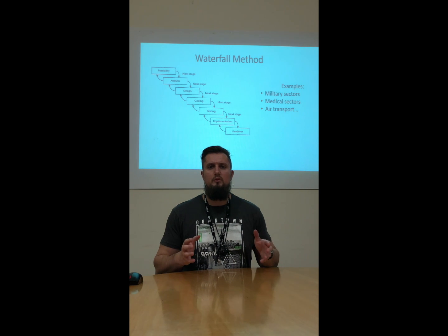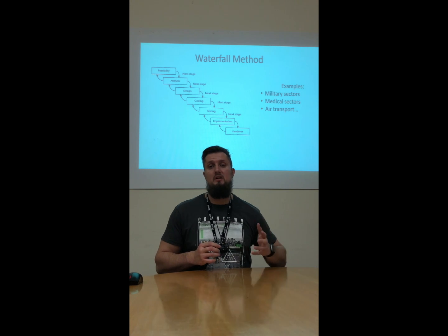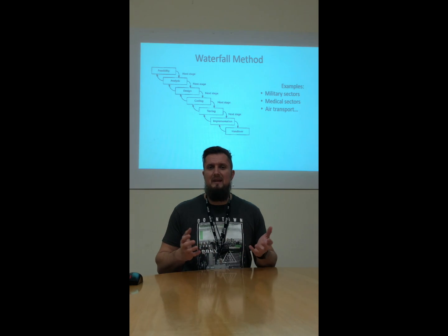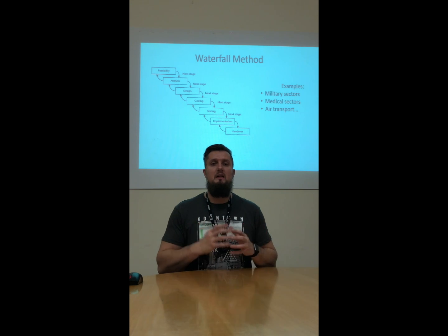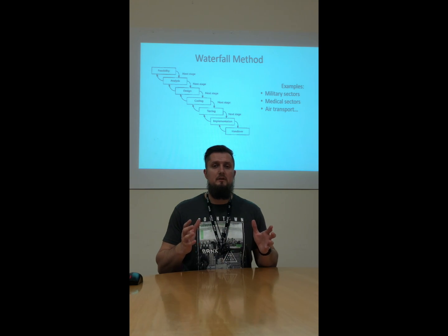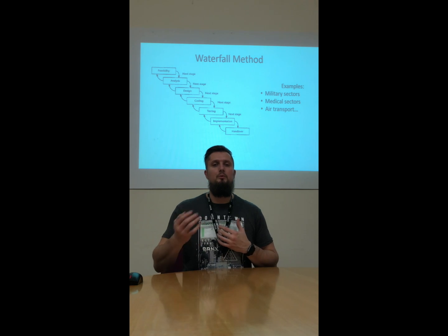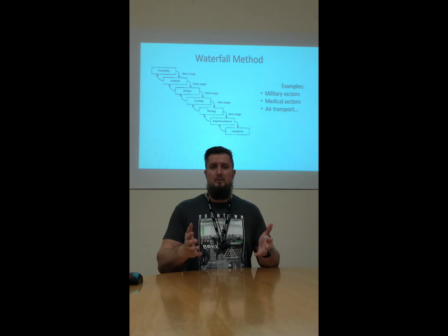Some examples where the waterfall method would be used extensively: military sector, medical sectors, and air transport. No one wants to build an airplane without knowing exactly what they're doing. Iterations as in an agile approach don't really work in this case. You have to have the full plan, full design before you start implementing. Medical sectors, people's lives are involved. You wouldn't want to tweak the software as and when a bug occurs, because the bug in this case could have serious ramifications.